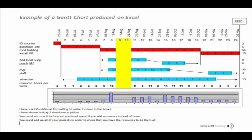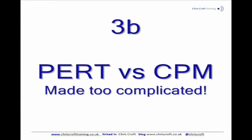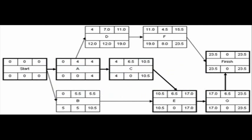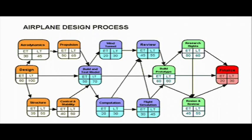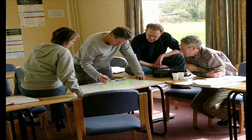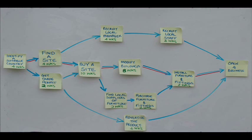A final thing I don't like about the way project management is taught in textbooks is that PERT and CPM are often shown as very complicated shapes with little subdivisions. People do a forward pass and a backward pass, and they calculate the differences, the float, and all of that. But in reality, you don't need to do that. You just put the time on each arrow if it's PERT, or on each box if it's CPM, and just add them up. It's easy enough to find the longest path — you don't need to put all the times in little boxes. That's what computers do, but that doesn't mean we as humans have to do it with our post-it note diagram. Have a look at this one here — I think you'll see it's pretty obvious what the critical path is.